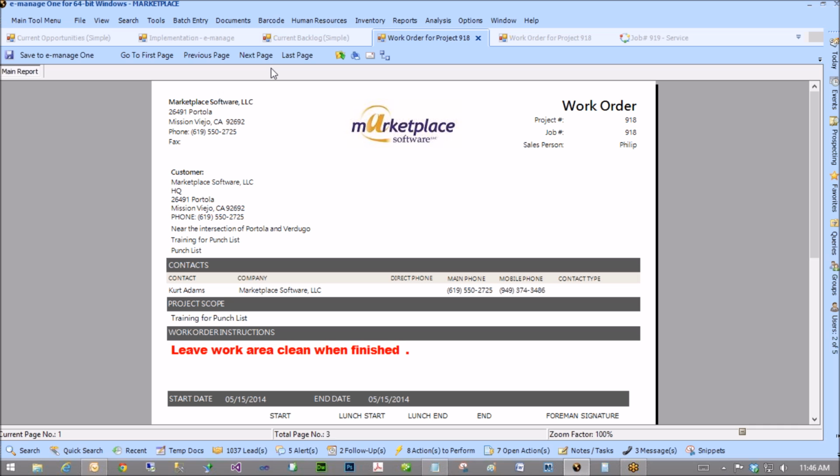Right. What you could do, though, is put a prerequisite in that says supply order name to process. Right? And then it's a checklist that they have to check off.